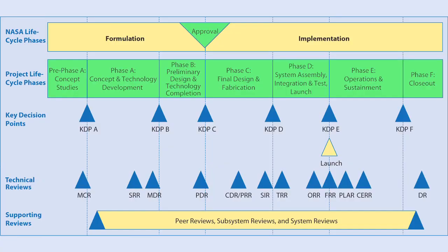And that's what Phase C is really focused on, that all the components meet the specifications that they were set out to meet. So you can more or less guarantee that when you put the whole spacecraft together, it should be able to operate the way you expected. The primary technical review in Phase C is the critical design review, and there's also a system integration review, and we'll talk about both of them.